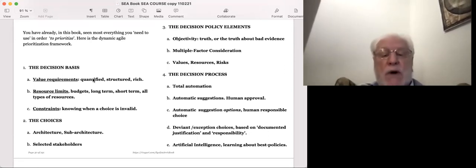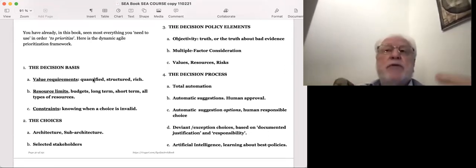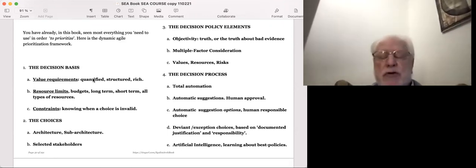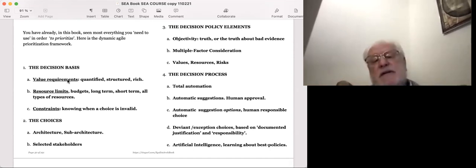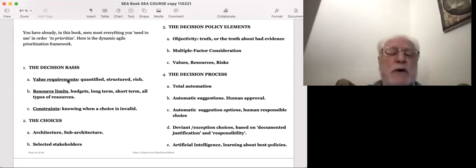We may have prioritized only dealing with the top 10 of maybe 30 or more important things we're going to do sooner or later. But that's just a short-term prioritization mechanism, the top 10 value requirements. And when we've worked them and achieved them, we will prioritize the next 10 or so requirements to work on.